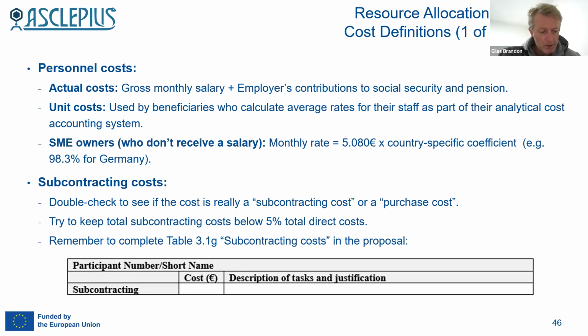for the reimbursement, if you have a project which is reimbursement of costs, and if you have a partner that has a budget of over 430,000 euros, then they are required to provide an audit certificate, an audit statement on their financial statement. And this needs to be provided by an accounting company. This is not something new. This has been going on for years.